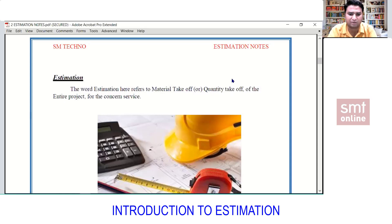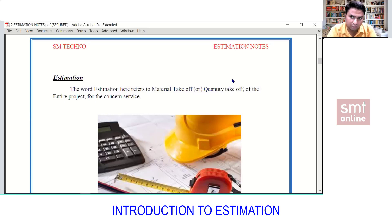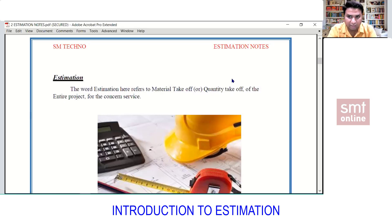For example, in plumbing and firefighting, we have pumps, tanks, piping, sprinklers, water heaters, fittings, accessories, and many other components. Based on the designed project, it moves to the estimation department. What they do is extract the complete data from the design drawing, SLD drawing, or DLD drawing — generally called the architectural layout or architectural drawing — because that is where the design is done.